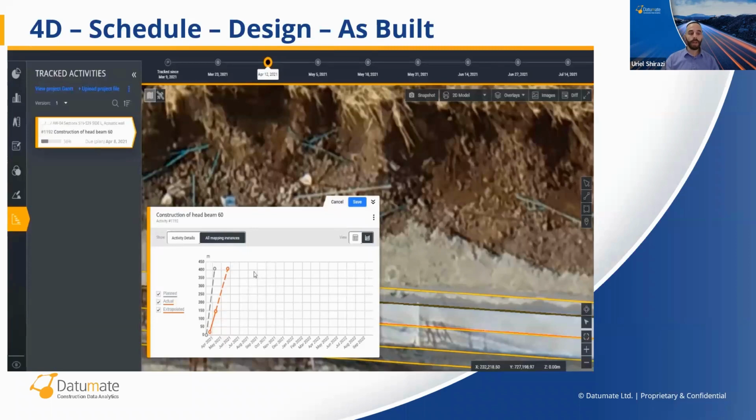The red broken line is the forecasted progress or pace according to our previous pace and our previous progress in this task. And the top red dot represents the ending date of this task, and the delta between the top red dot to the top gray dot is how late or how early we are in this task. In this case, how late we are, unfortunately.